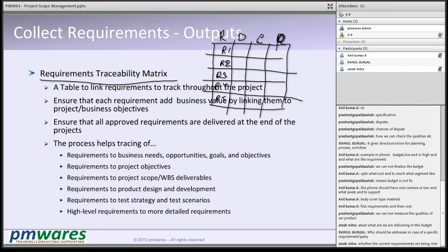Once you do the design, you tell that section 3.2 of the design addresses this requirement. Section 1.2 addresses requirement 2. Section 5 addresses requirement 3. Section 6.5 addresses requirement 4. Section 9 addresses requirement 5. Similarly, when you say construction, you say the XYZ file is for requirement 1. A particular hardware and this software is for requirement 2.